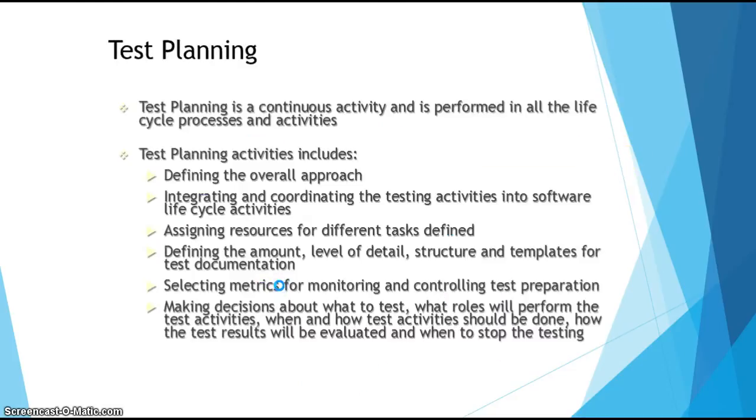So test planning includes defining the overall approach, coordinating test activities into the software life cycle, defining the level of detail, structure and templates for test documentation, monitoring and controlling test preparation, and making the most important decisions of what to test and what roles will perform which test activities.